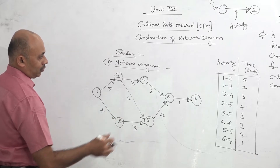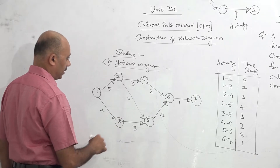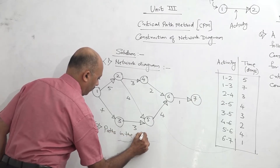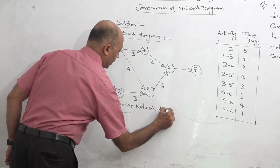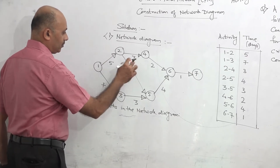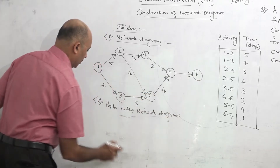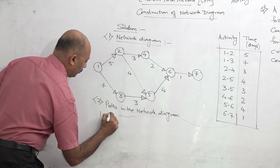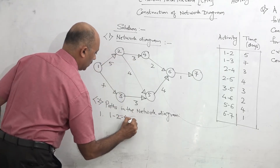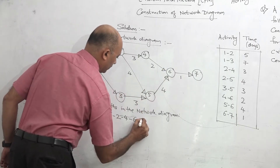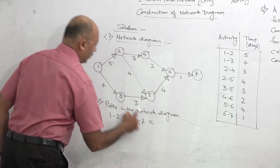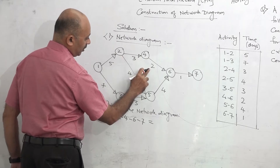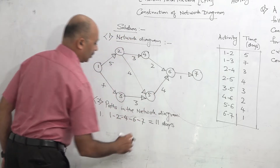Now we go to identification of the critical path. Before going to the critical path, we should understand what a path is. A path is the number of ways you can go from the start of the project to the end of the project. The first path connects 1-2-4-6-7. Adding the time along the path: 5 plus 3 is 8, plus 2 is 10, plus 1 is 11. So the total time of path number 1 is 11 days.